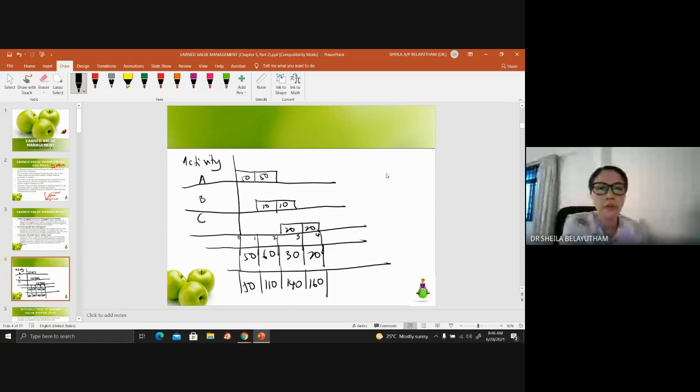Imagine that activity A starts at 0, and the earliest finish is by 2. Activity B starts at 1 and is completed by 3. And activity C has an earliest start time of 2 and an earliest finish of 4. Let's say this has been attained from the network diagram, for example. The budgeted cost for activity A is 100 ringgit, activity B 20 ringgit, and activity C 40 ringgit. What we usually do is divide it equally based on the duration.